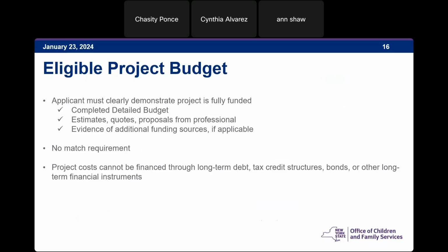At least one qualified estimate dated no earlier than October 1st, 2023 for each project task should be submitted with your application. All of those project estimates can be on one estimate. If you have 17 different tasks as part of your project, you don't need 17 different estimates. You just need one. If you have a contract manager or a design consultant that is doing your estimation, they can estimate the entire project from start to finish on one estimate.